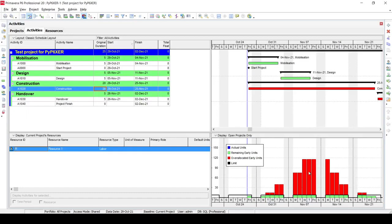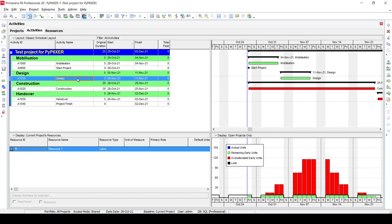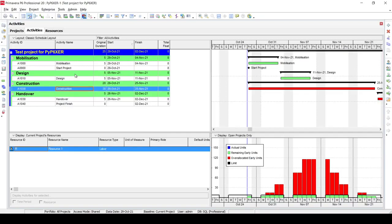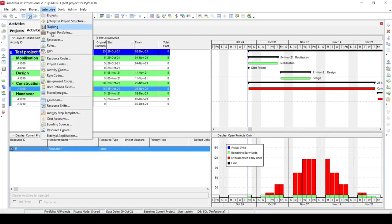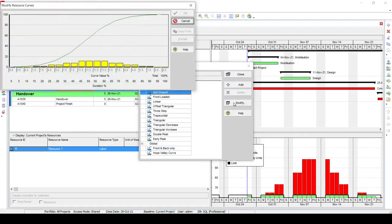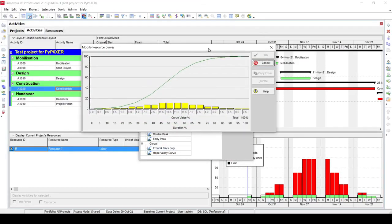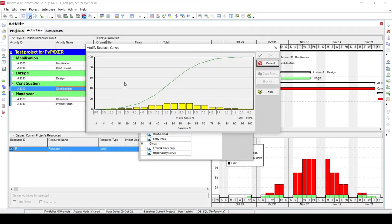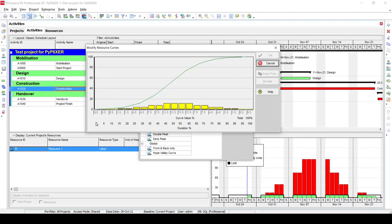In order to be able to calculate it in Python or Power BI or any other programming language, we open the resource curves, go to the bell shape, and hit modify. Here it will show you the distribution, what is the requirement for every period.